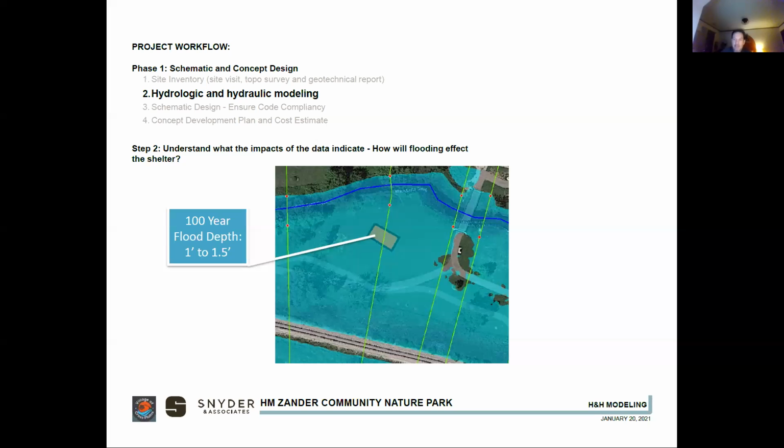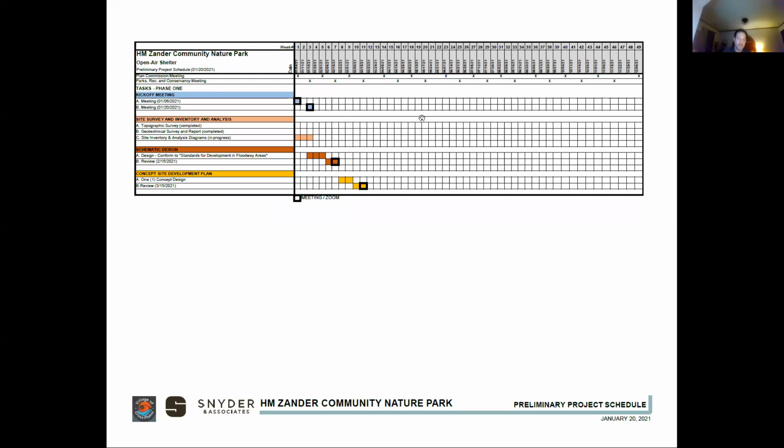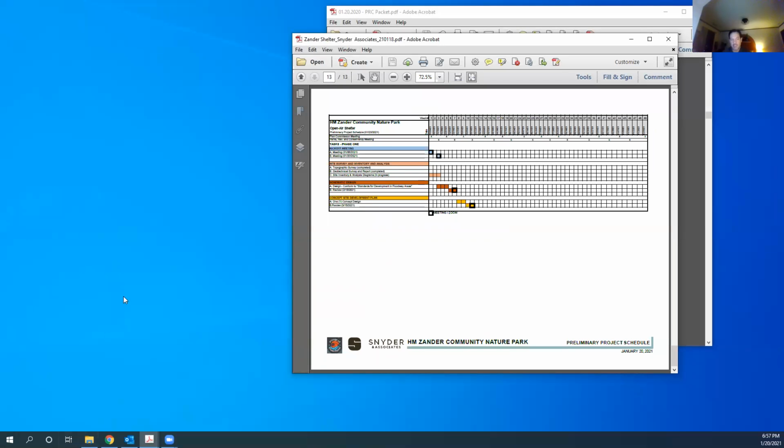Yeah, this is Kevin. I think, Mike, the design that I'm guessing was shared is the one we proposed for the Lions shelter, which has 4 pillars. Again, if you're limited to 4 and you're trying to minimize the impact, you're going to go 4 versus 6. And if you go 4 versus 6, you're going to go steel versus wood. So I think those are all the things we would have to think about, because cost varies, right? And it's going to impact the overall pavilion or shelter cost. But playing with those tolerances is where I was going.